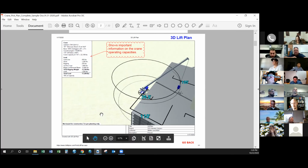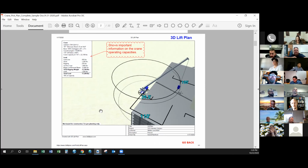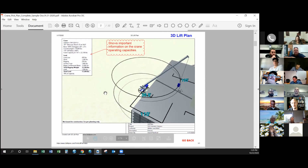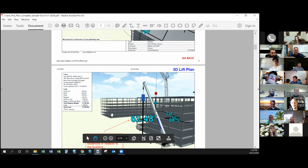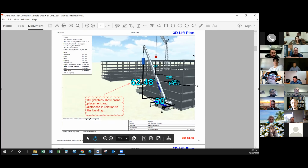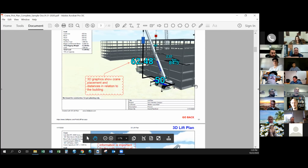And that's why in the initial checklist, we walk the job site with the crane vendor, the GC, and also Walters and Wolf Safety, and then it is determined, based on what we're going to be hoisting, what size crane we need. That decision is not left to the PM or the field guy. We tell the vendor what we're hoisting, and they then tell us what the needs are as far as what size crane and what capacities we need. So all these right here are documents that our crane vendor will submit, and we in time will submit it to the GC. If there is anything that has to be modified, then our crane vendor has to make the adjustments.